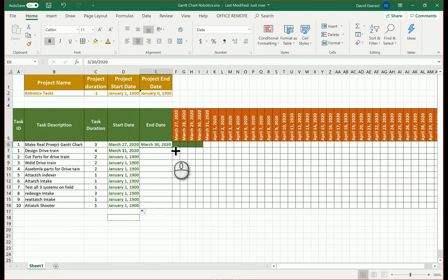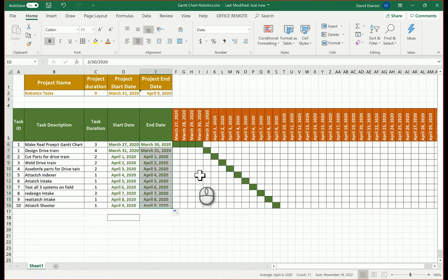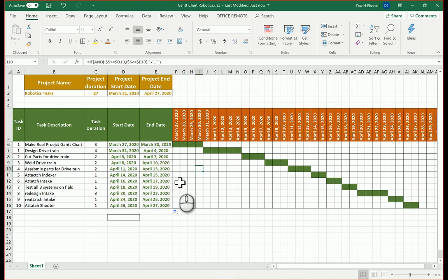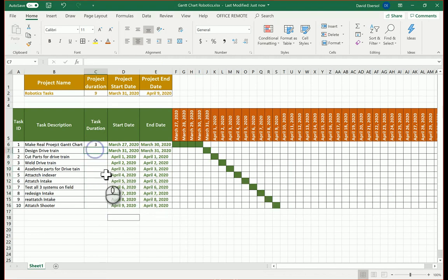And this, just like our last one, is going to be equal to all of those plus... Now, whoa, what did I do wrong? Oh, okay, I see. So this guy is equal to this plus the duration there. And then we'll copy that down. Okay, there we go. But these values are not right, so we gotta do them according to what you said.